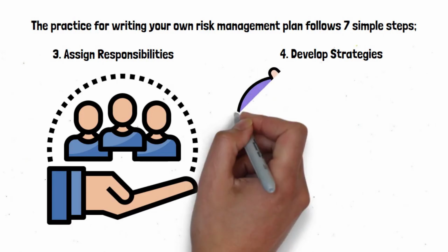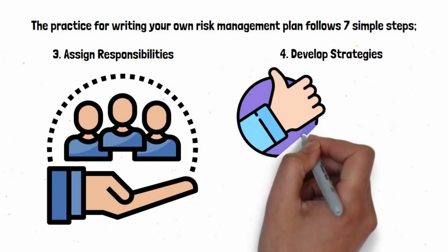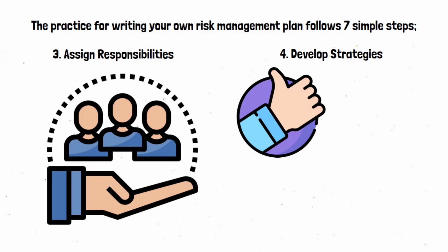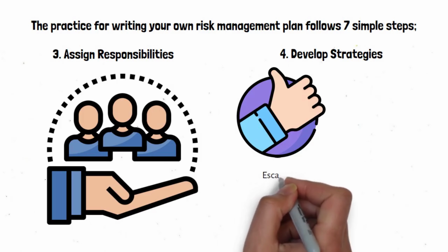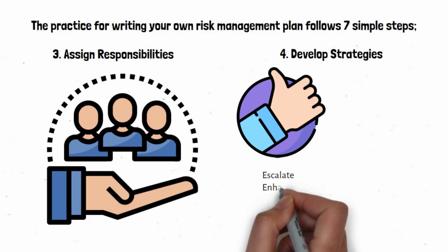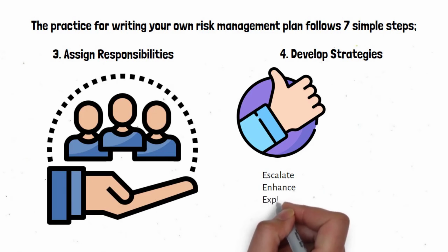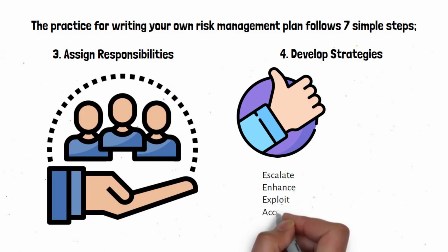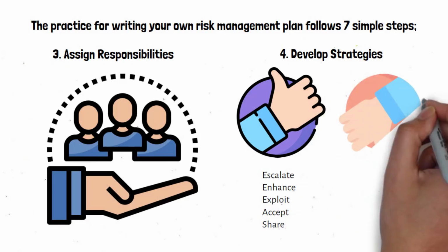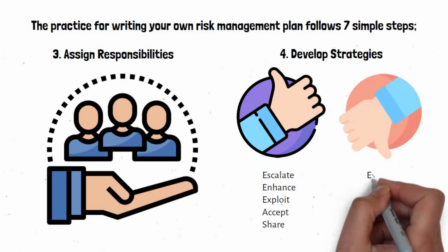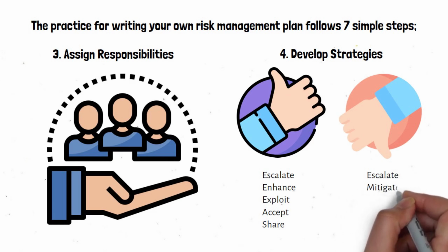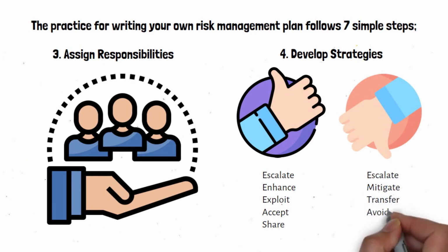Risk response strategies can be divided into 2 categories. Risk response strategies for positive risks: escalate, enhance, exploit, accept, share. Risk response strategies for negative risks: escalate, mitigate, transfer, avoid, accept.